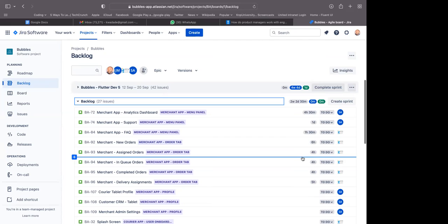No. So in this release, we must get these things out. Then when we get those musts out, we prioritize on what we should be doing next. If we still have time, then we can add the coulds. Does that answer your question? Okay. I hope that answers your question, Simone.